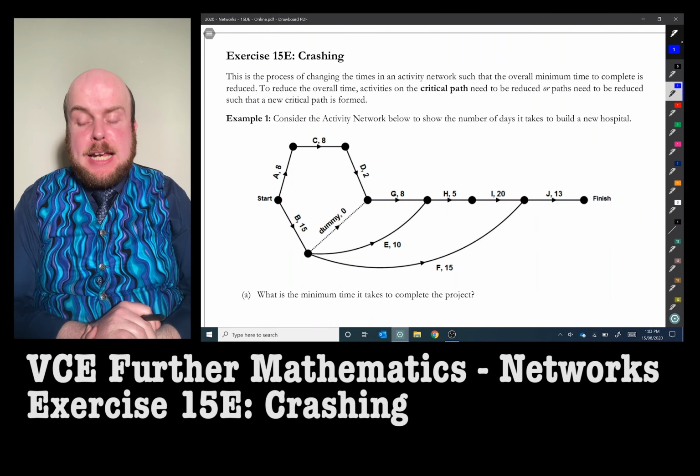So we won't reduce F. For I, in order to get this to work, I needs to be reduced to the maximum. So reduce I. Now, what was I initially? It was 20, so we can take away 15 hours. So we can go back from here again.